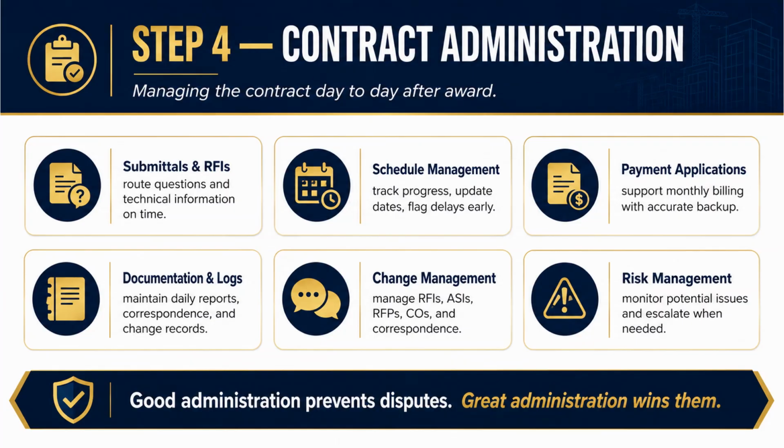Payment applications support monthly billing with accurate backup. This is cash flow, getting paid on time for work performed. Documentation and logs. Maintain daily reports, correspondence, and change records. The record we've been building all unit. Change management. Manage the RFIs, ASIs, RFPs, COs, and correspondence. The whole change machine we just walked.